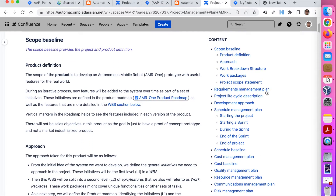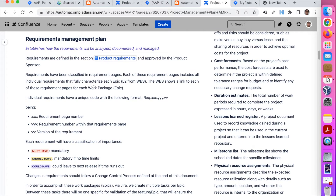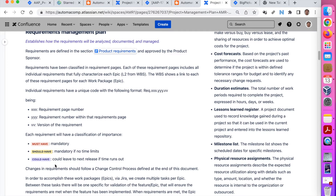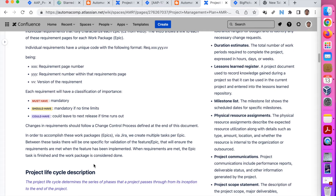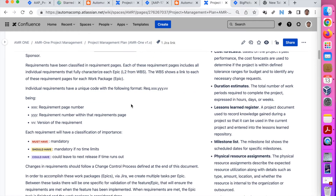Then we go to the requirements management plan. All of these are sections inside the project management plan — they are plans. They include not only the plan for the project, but also how we are going to manage it. For example, the requirements section explains how they are named — like requirement page number, requirement number, version of the requirement, and whether it is mandatory, should-have, or could-have. So it is an explanation on how you organize the requirements, so anyone that goes to the requirements can see that information.